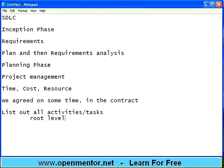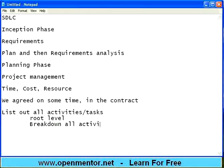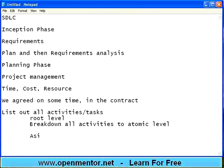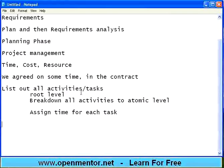Start listing out every aspect. For example: create database design document, internal review of database design document, external review of database design document. Break down all activities to atomic levels. If you are able to do that and then assign time for each task, then you will know where exactly you stand. If it is not done, you cannot track it. Project scheduling is itself a huge area — we can talk about it for hours and hours. I am just touching this because this is an introductory session.